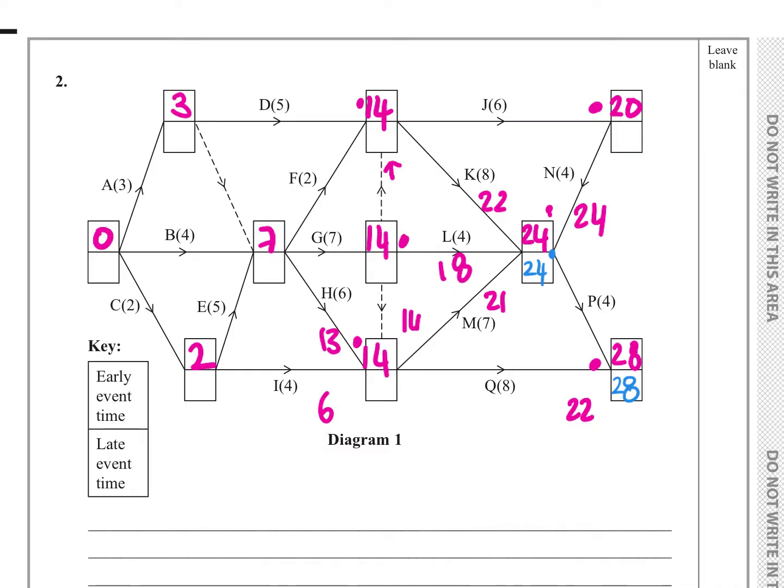So when I look at this one is also 24. 24 take away 4, 0. 20, okay. This one here, I can either do 24 take away 7, which is 17, or 28 take away 8, which is 20. Which one am I going to choose? 17. Because I choose the smallest, don't I? Is that all the ways? Yeah, that's all the ways. So that is 17. Okay.